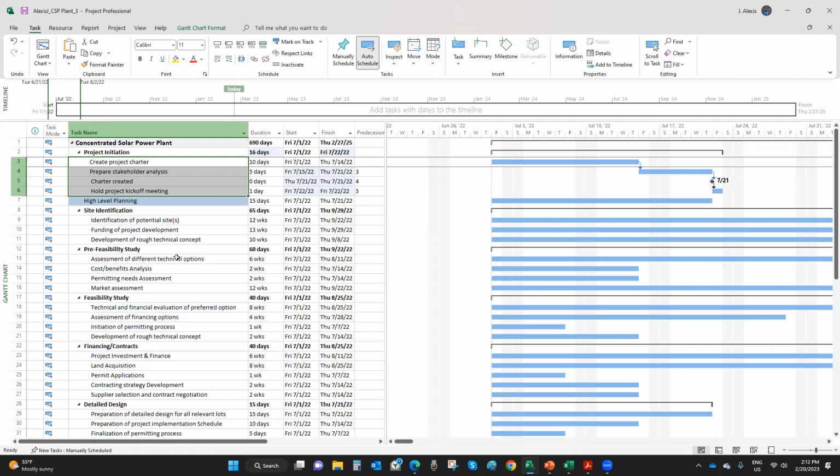Why wouldn't you carry out project activities in parallel at the same time? There are two reasons for it. First reason is because the nature of the work wouldn't allow you. For example, you can't test an equipment until you've built it. You'd have to build a prototype first, at least, and then test the prototype, right? So the nature of the work doesn't allow you to do those two things at the same time. So you have to do one first and then the second.